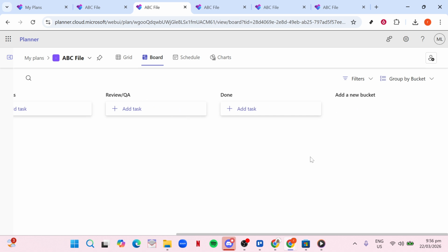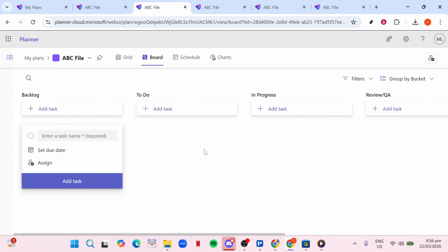After that, create an In Progress bucket. This is where tasks go once someone has actually started working on them. It's helpful to keep this bucket limited. If everything is in progress, nothing is truly being focused on, and that's how bottlenecks form.